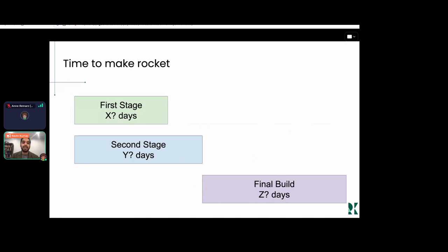The challenge is you don't actually know how long it takes to build any one of those SpaceX rockets. There's ideas a priori, maybe we put in the system it takes 4 days to do this and 5 days to do this, which means that this block will be 5 days, and then maybe the final build takes about 10 days, so this will take 15 days. Everyone's got point estimates and point numbers, but in reality, we don't. For the rockets moving forward, it's not always going to be exactly 15 days.